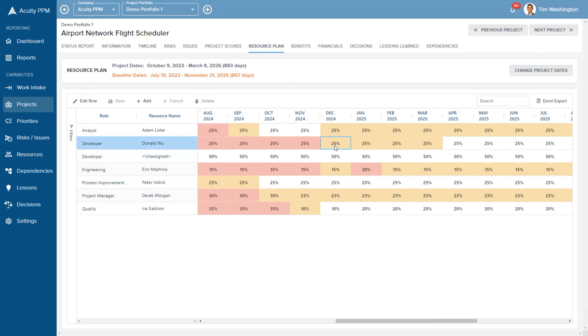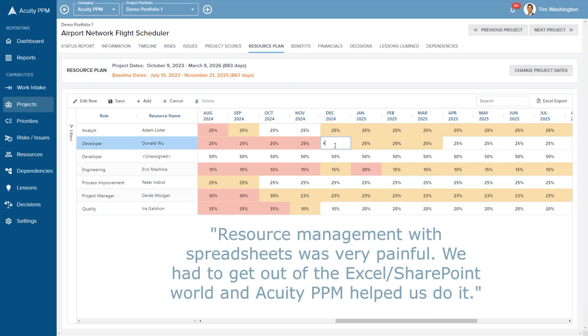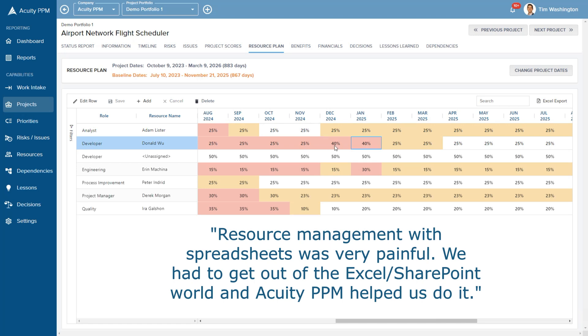The resource heat map alerts project managers of overutilized team members so that they can proactively address resource issues.